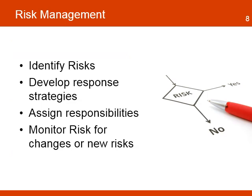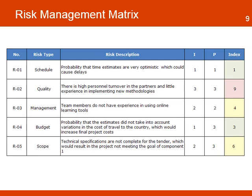Risk and assumptions are also an important element in the project management plan. The plan will identify the risk, develop responses, and assign responsibilities for all critical risks in the project. The plan will be used to monitor any changes in the risk or if there are any new risks. The use of a simple matrix can help in the identification and monitoring of all risks of the project. Each risk is quantified by the levels of probability and impact. The risk index is a simple multiplication of the probability and impact values.